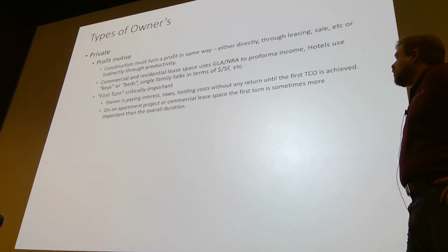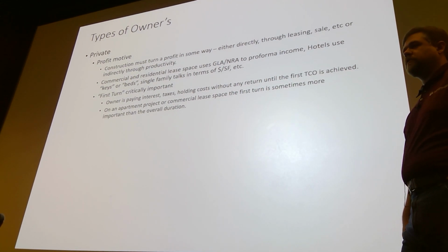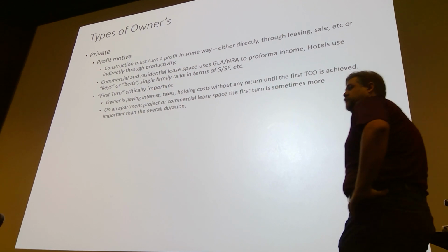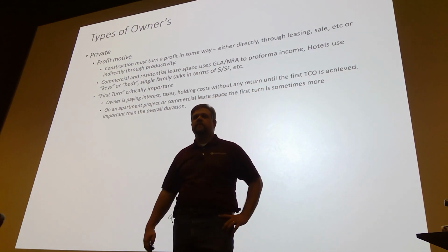Talk about first turn, why that's important, why giving the owner even a small piece of the project is important, and that was that then the owner starts generating revenue, so it's not just a dead loss any longer.